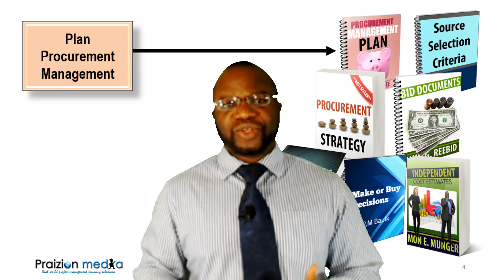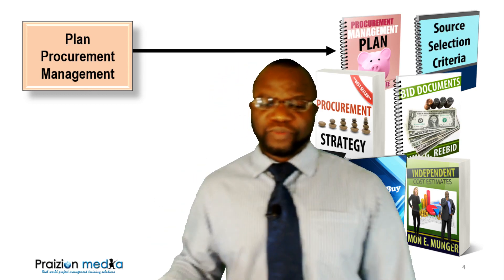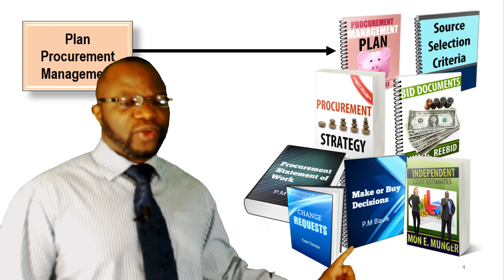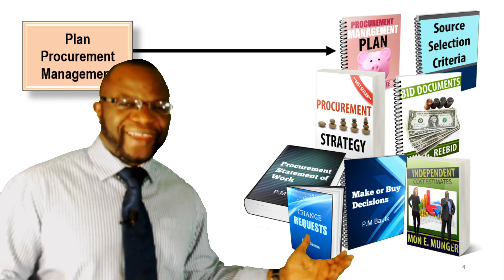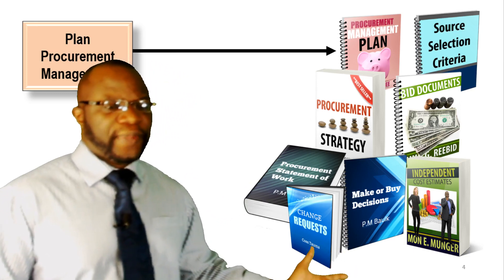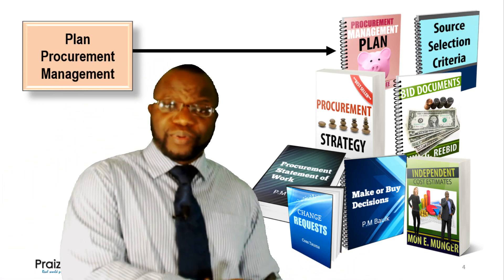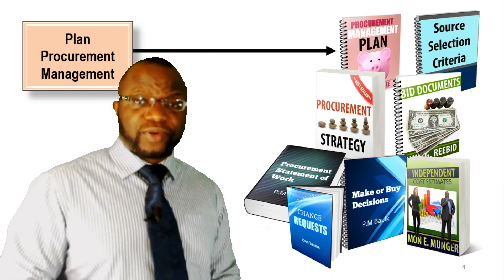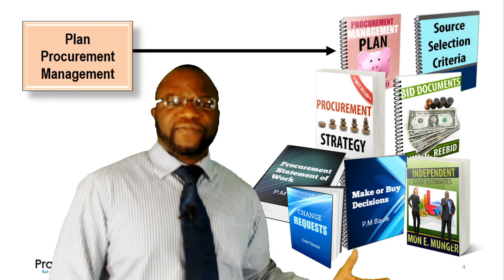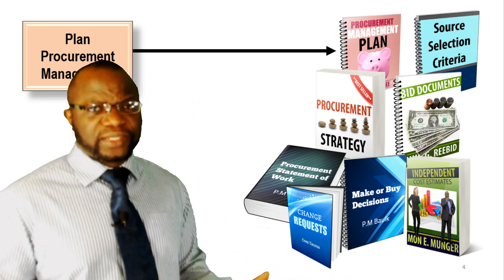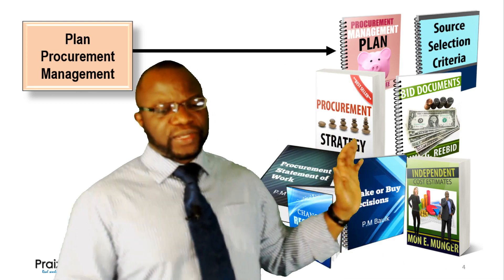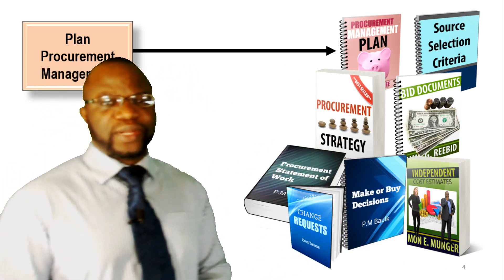Another challenge is knowing the tools and techniques. And of course, change requests — how could I forget? Change requests are not unique but are important, and that's why they're number eight. I said there were seven unique outputs — change requests are not unique, but they are important because they're an anomaly: Plan Procurement Management is a planning process, yet you get change requests out of it. This also happens in Define Activities. You wouldn't expect to see change requests in planning, but there it is. I call these unique aspects out in the book.